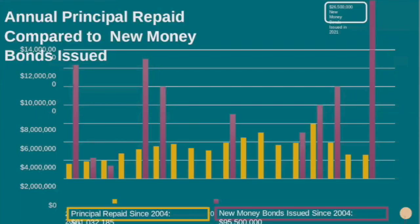One of the potential criticisms we had of the series 2021 bonds, which were all sold at one time, means that you start paying interest in May on those, and they're not earning the interest due to construction. If the project is going to require the expenditure of the construction fund right away, that would be a reasonable idea for selling all at once. But when we can't reinvest money, we found this better, like we did with the issue approved in 2017, which was split into 3 pieces. And all of them called 5 years, and you're reaping the benefits of that right now.